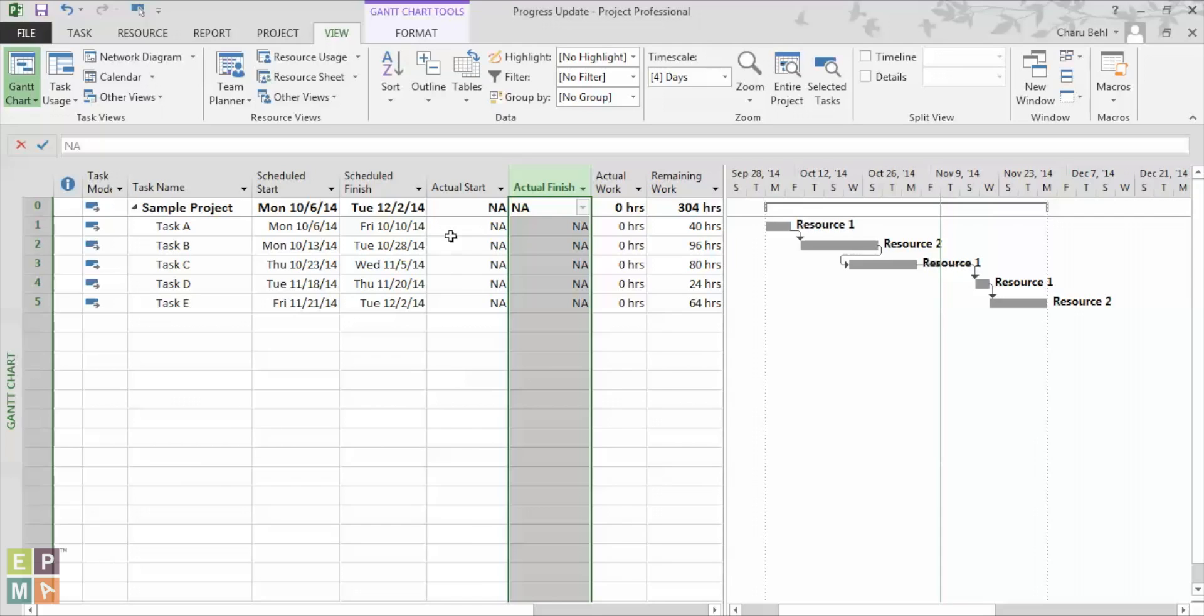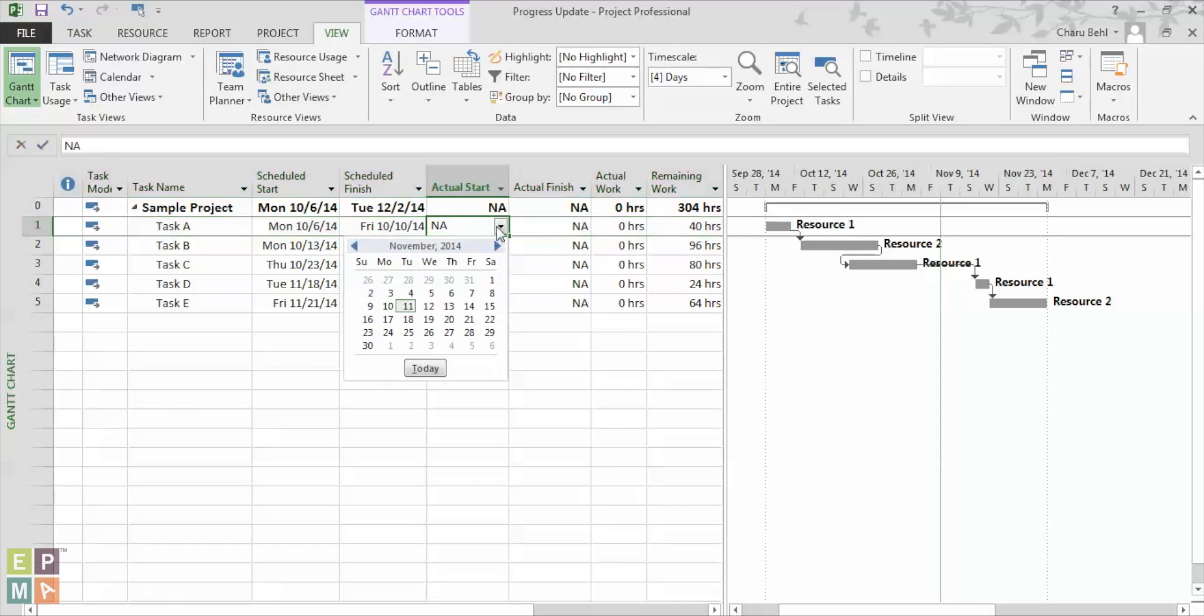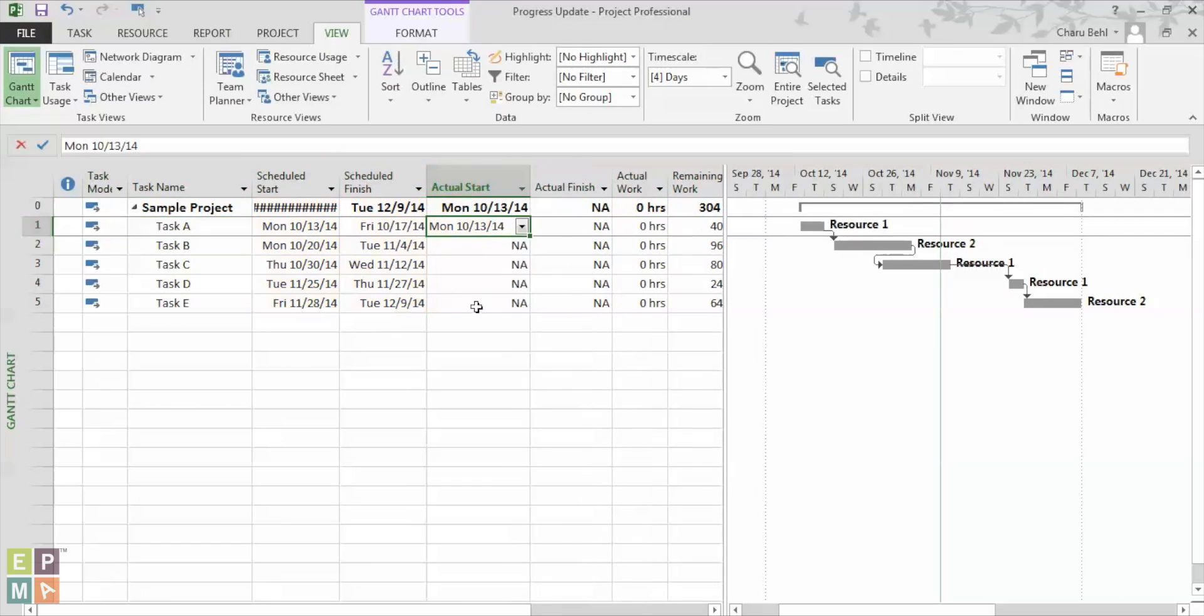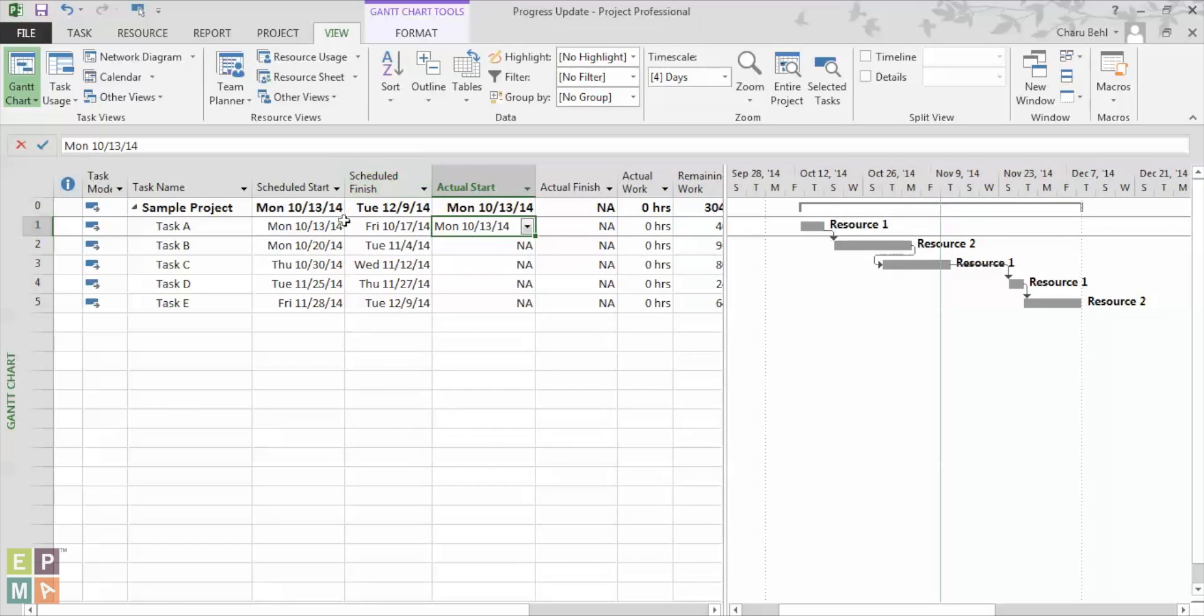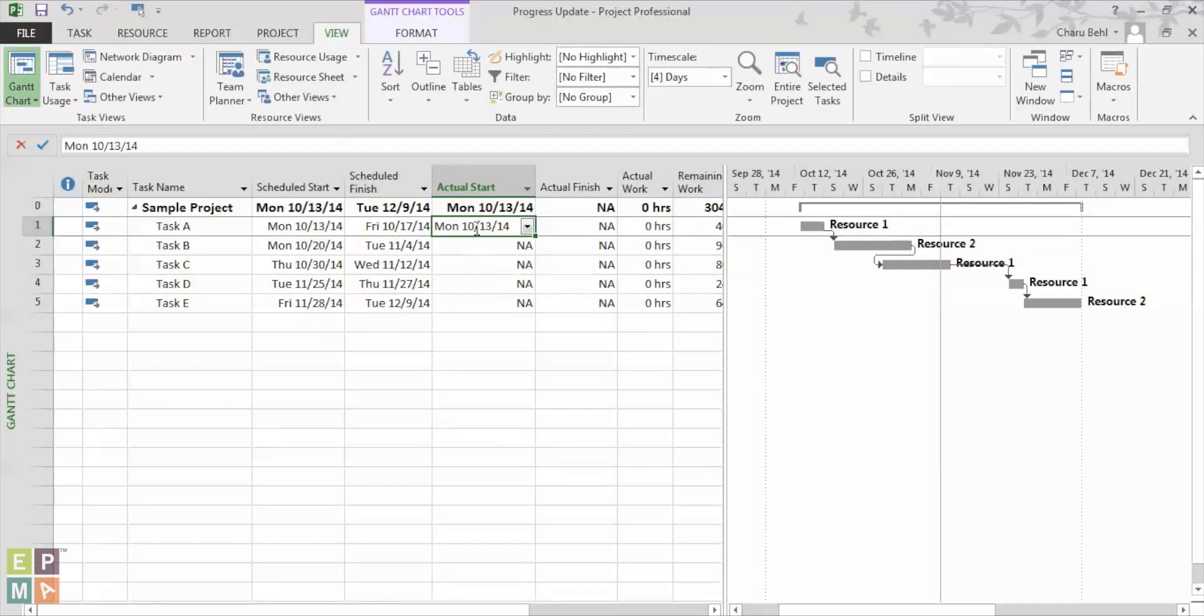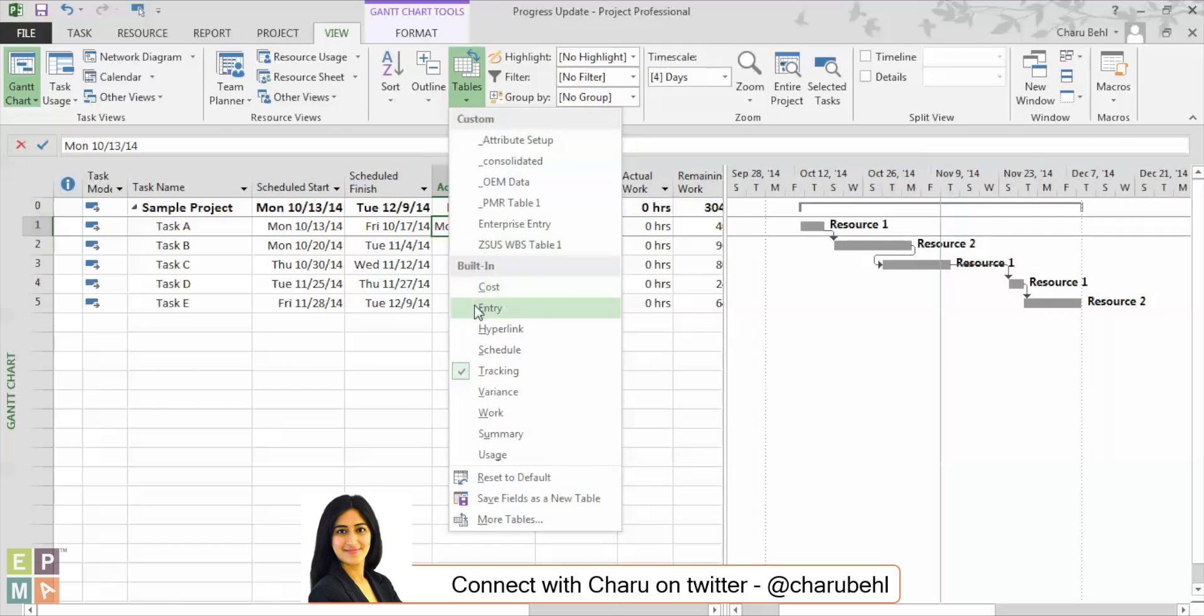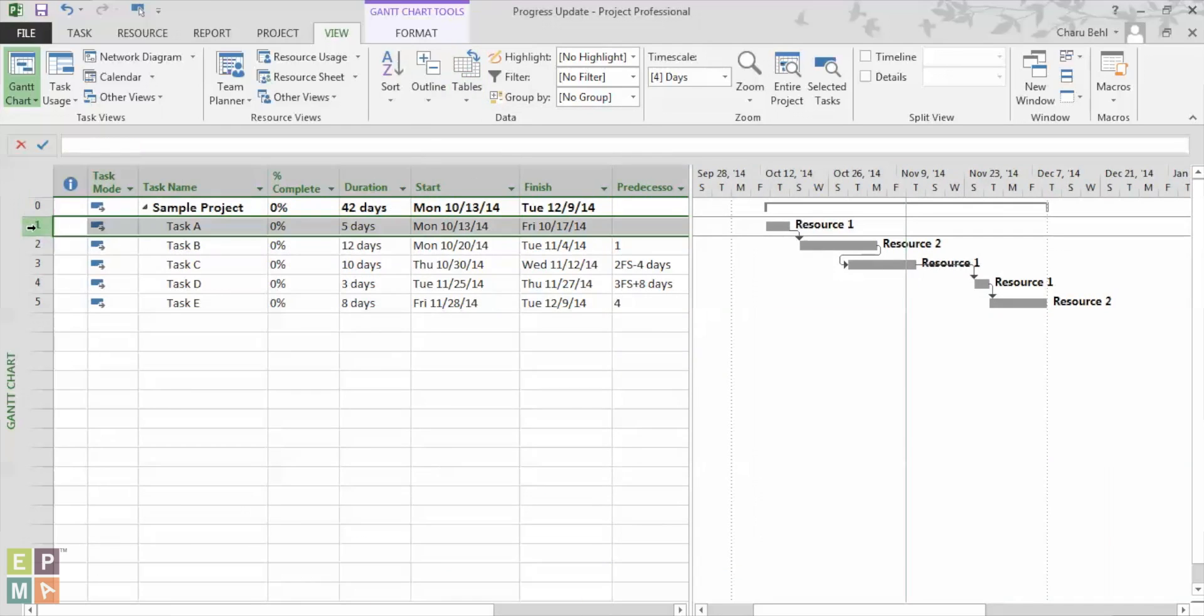So for example in this task instead of starting on the 10-6 schedule start date it starts on 10-13. And you see what happens, Microsoft Project automatically pushes out the schedule by a week and now once I know my actual start date I can actually go back to my entry table and select the task that I want to update.